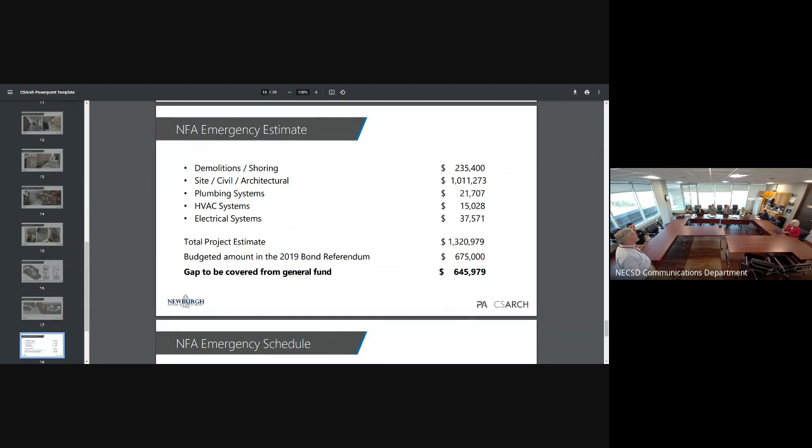Yeah, so these numbers do have contingency in them. We're holding, I wanna say, 10% estimated contingency. We actually put 15% contingency for what we're calling a bid time market factor, because we're bidding it now. We put 15% on the numbers because we're bidding it now. We know we're gonna pay a premium. And then we've got the normal 10% construction contingency, and then the incidentals on top of that. Okay, so there's some buffer built in. There is. Thank you.